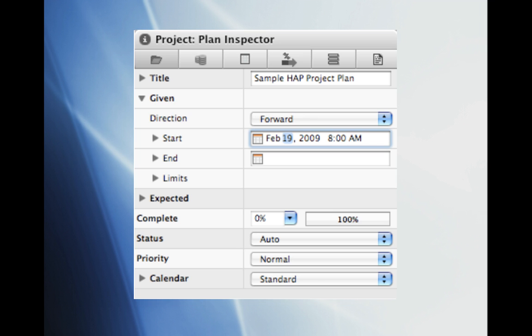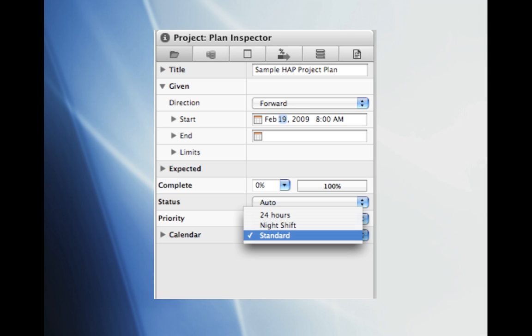The next thing we'll want to do is to select a project start date. To do this select the appropriate start date on the right hand side of the screen. In this case I have selected February 19, 2009. Make sure to select your appropriate start date and also the appropriate calendar. The calendar will set the working hours for your project. In this case we will select the standard 8 hour working day.